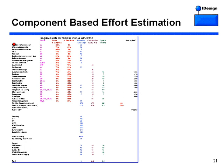When you estimate effort, break it down into all the lifecycle activities of individual components. Have a table per component where you estimate those things. After that, you take all of those and put them in a long shopping list of all the various activities and estimations. Once you have that, you know how long it will take to do something. The order in which you do that is the integration plan, which captures the dependencies between components.